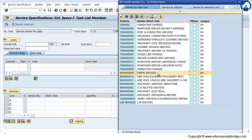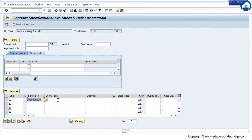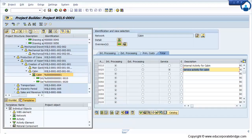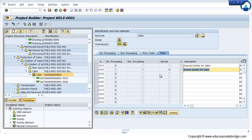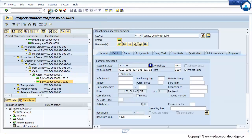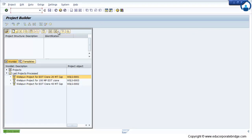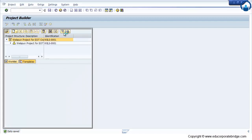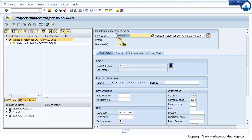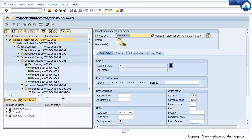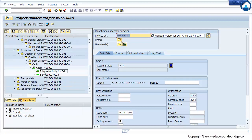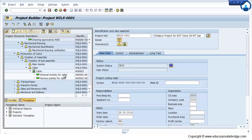So let's take a hiring services. It asks you the quantity, so enter the quantity. The cost element will automatically get picked up from service master and maintain the price. Click on back and just save. So this is the way to create an internal and external activity for the services.